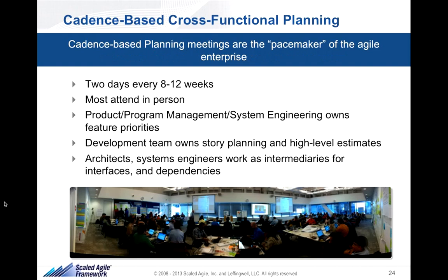One key element of SAFe is cadence-based, cross-functional, face-to-face planning. And what you see here in this picture is a typical, I'd say large end, but typical face-to-face planning session. This one involves about 150 practitioners in 3 countries. There's a large team in Mumbai. They're still in Mumbai. So when we say face-to-face, what we mean is really contemporaneous planning. 15 or 20 people from Kosice, Serbia are here. Their teams did not come. We couldn't afford that, but the leads were here. And then all the development teams in the U.S. were here, and we planned for basically 2 days or a little over 2 days.